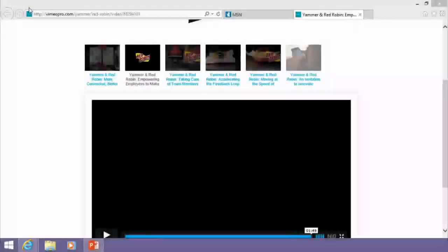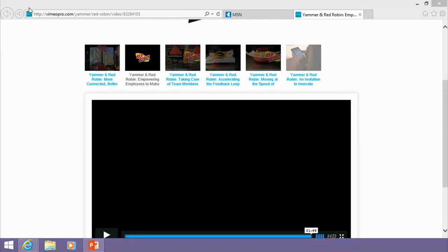What I do is I create a second column that I like to call phase. In this second column, I put the phases of my project, because you might not want to report on a whole long big project. You might want to report on it by phase. So we need to identify which tasks or groups of tasks belong to what phase. Then we can create a timeline for different phases. You can have as many timeline views in here as you'd like, and I was going to show you how to do that.